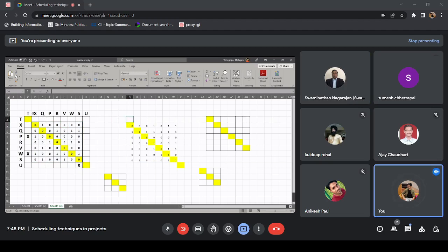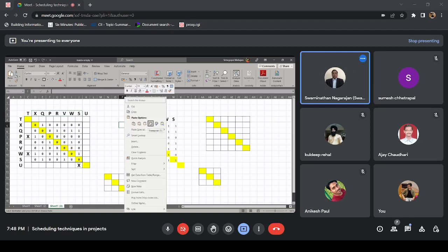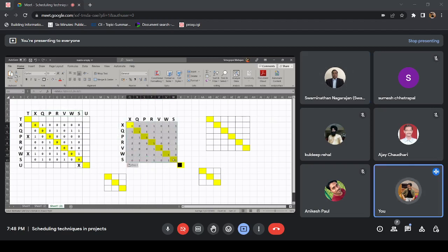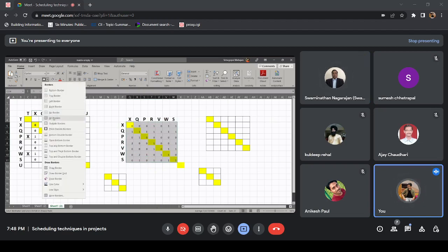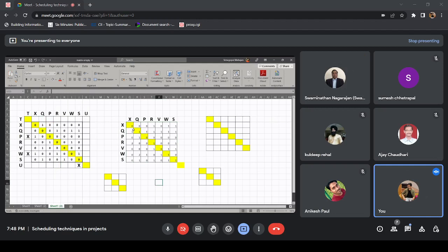So now you have got something, but how to interpret it? Can you guys all see this matrix? All the diagonals in your active block were 0. But when raising it to the power, I mean squaring it, we squared it, this is n square, you got 1 in some diagonals, right?